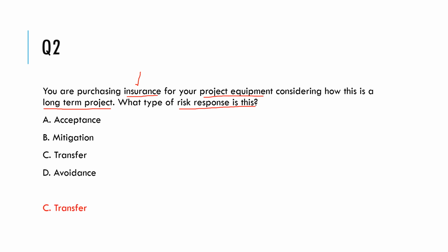The correct answer is transfer, because you are transferring the risk on your project equipment to the insurance company by purchasing insurance. So pretty straightforward again. And if you have gone over the risk response strategies, this should have been an easy question.